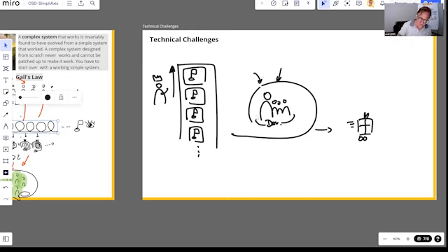And it can be any interval up to 1 month. But once you have defined the interval, it stays constant. So in our teams, for example, we are working with 2-week sprints. It's always 2 weeks. And how does it work?